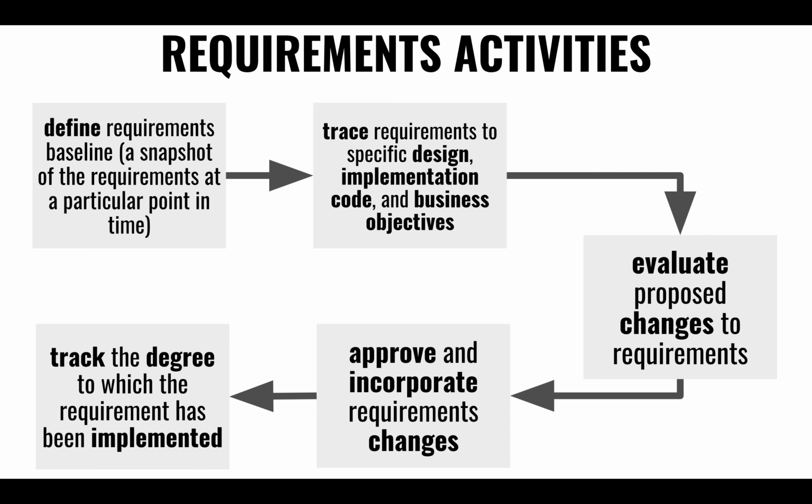We want to make sure that we trace it and we know what the status is, whether we have not started it yet, or whether yes, it made it into the next couple of sprints. And by the way, these are all the tickets that were created in Jira for keeping track of the status of that requirement. And look, these are all the branches that were created for implementation. These were all the files that were created. So there's a traceability of knowing exactly what happened to these requirements.